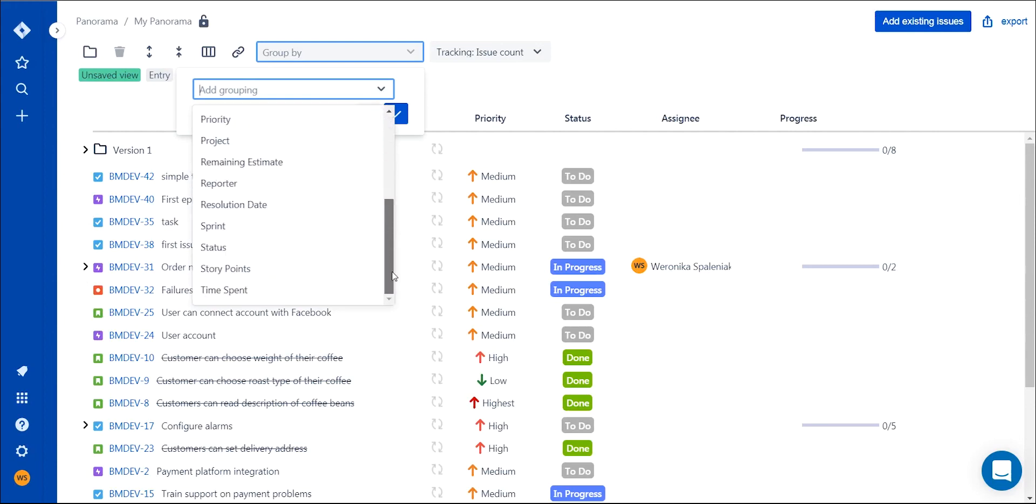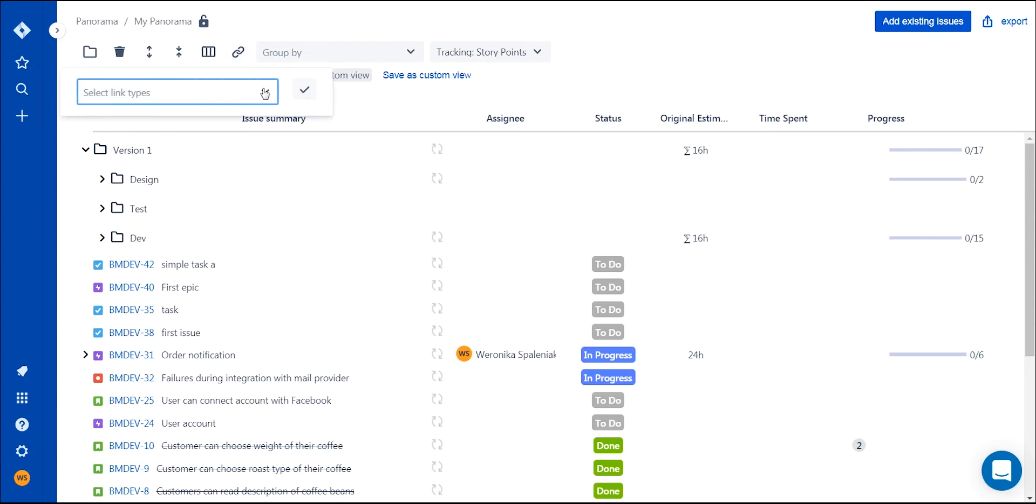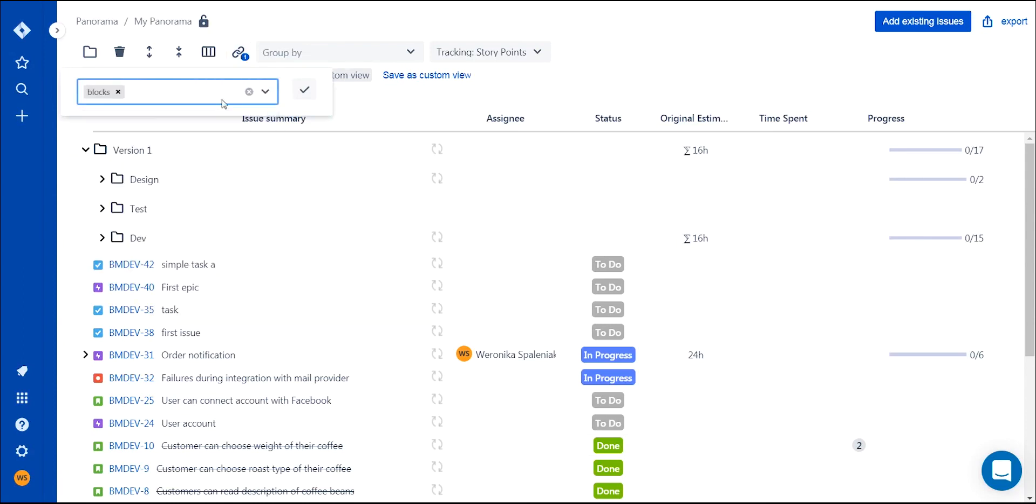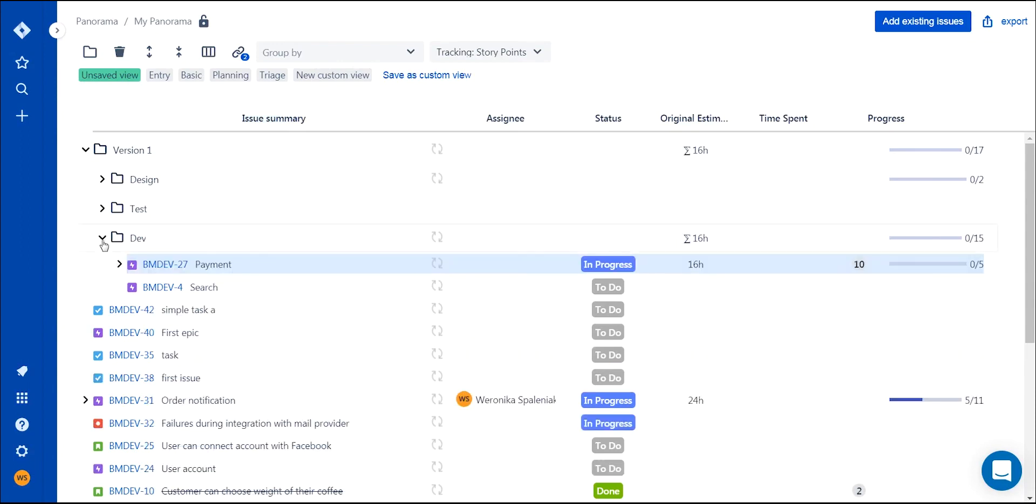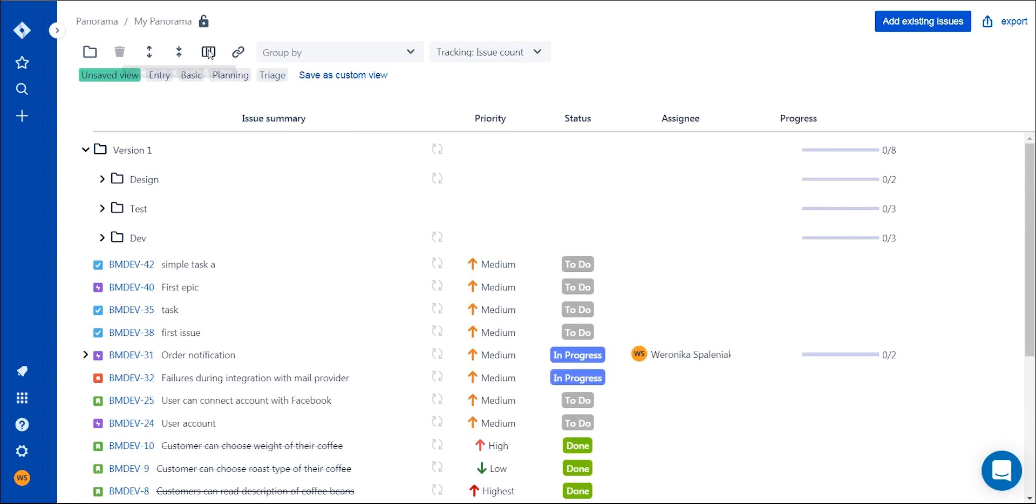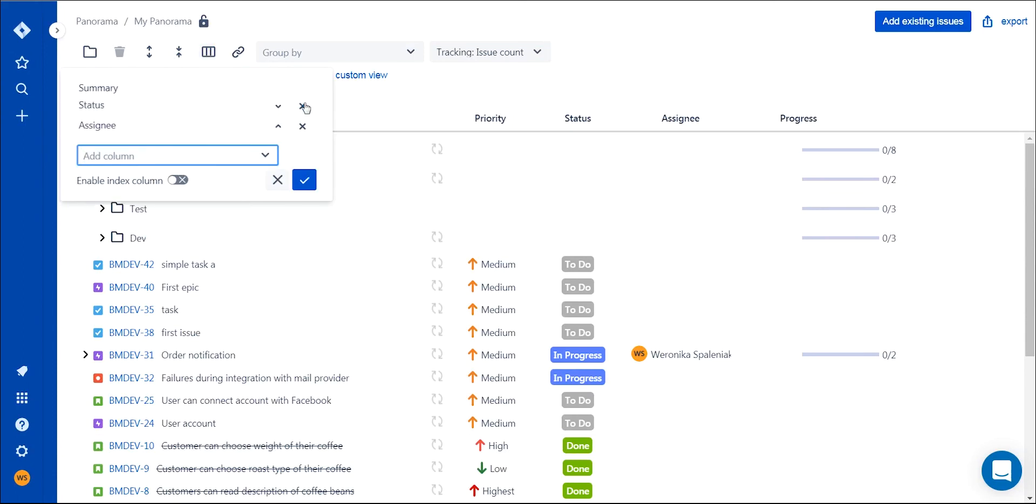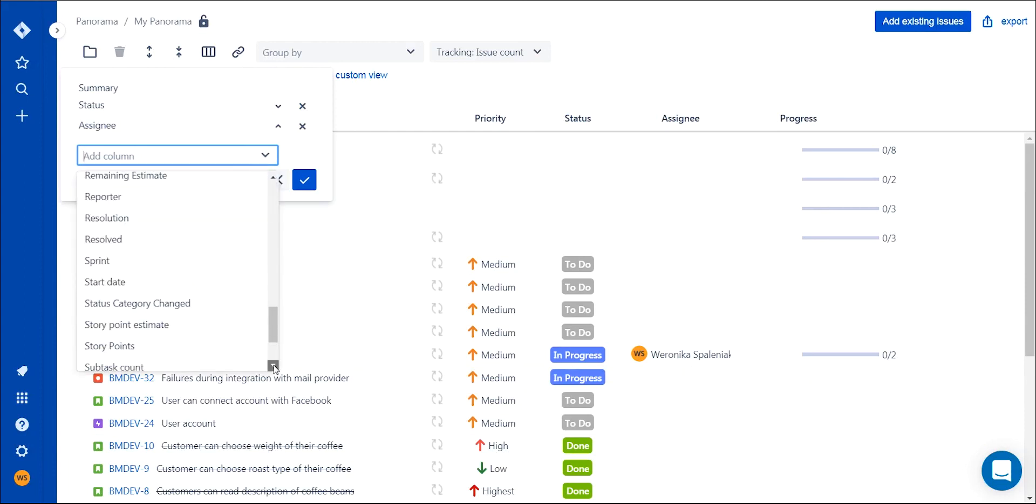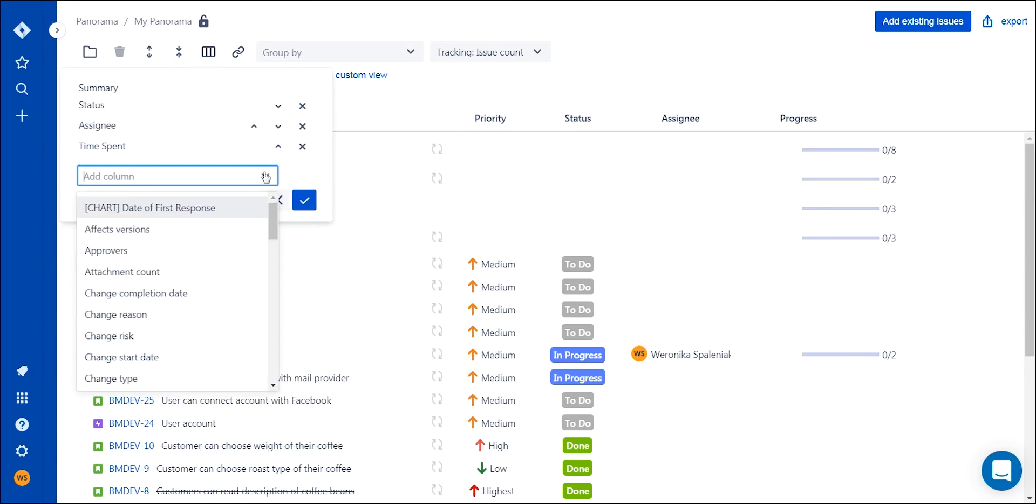We've also created a linking feature that allows you to see links connected to each issue. If you want to check what delays issues with the status of to-do, you can add isBlockedBy in links and status in the grouping, and you'll have your answer. In order to competently and efficiently manage your product and have all relevant information available at a glance, you can customize columns to show all the issue fields you need.